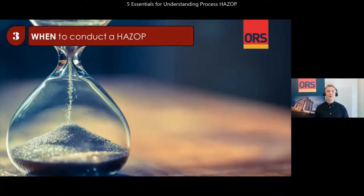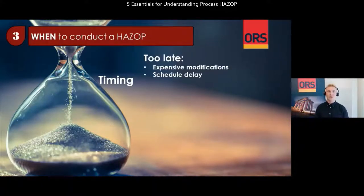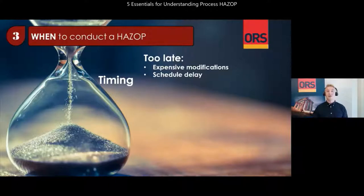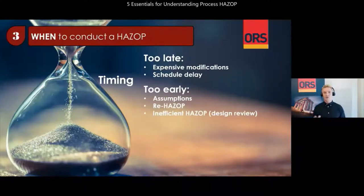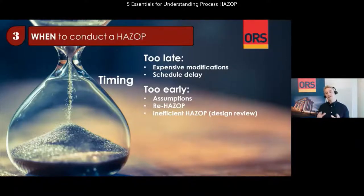Moving over to when to conduct a HAZOP. A HAZOP is time consuming because it requires the participation of a team over an extended period — it is an investment of time and resources. A HAZOP must not be too late in the project such that recommendations raised can lead to expensive modifications and delays. But also not too early in the project phase when there is insufficient basis of design, which leads to multiple assumptions and normally ending up requiring a new HAZOP at a later stage. As a rule of thumb, the design should have been through a design review prior to the HAZOP to ensure that the HAZOP doesn't serve as the design review itself.